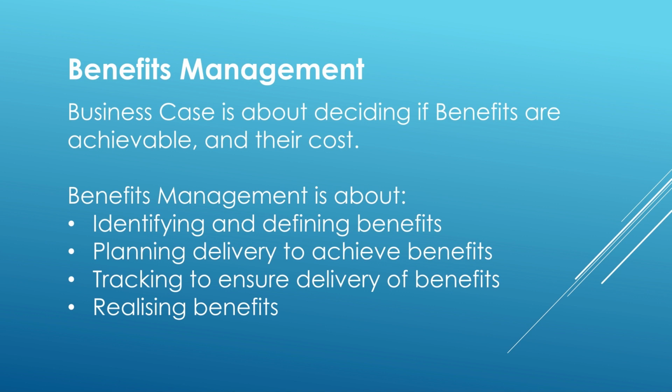Benefits management is also, of course, about planning delivery of objectives. So the products, the services, the outputs that we're going to actually deliver that will provide those benefits for us. And benefits management is about tracking our projects to ensure we are in fact delivering those benefits. And then at the end of the project, once we've completed everything else and we have our overall product that can be put into the real world and becomes part of our business as usual, we should see those benefits or realize those benefits, to use the correct term. So benefits management often is something that the project manager does, but it ties directly to the business case, and it's part of the project sponsor's role to make sure that they are tracking those benefits through to ensure that that's actually what we're going to get at the end of the day.